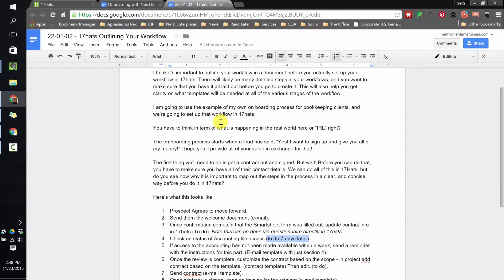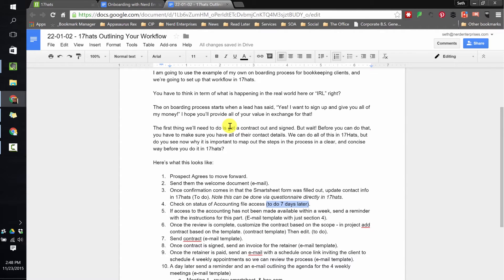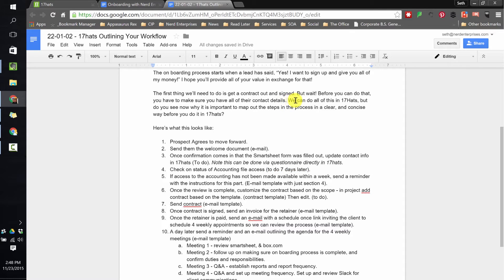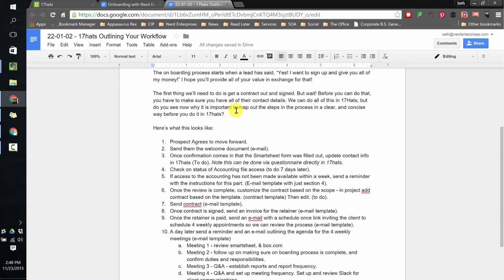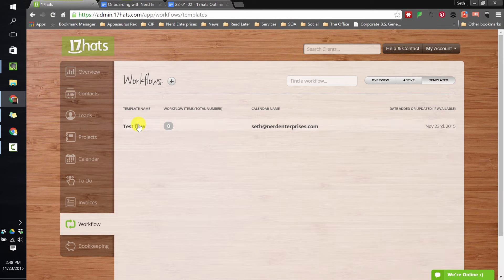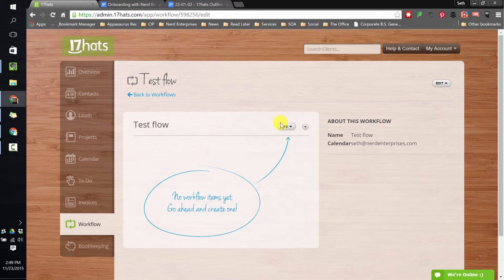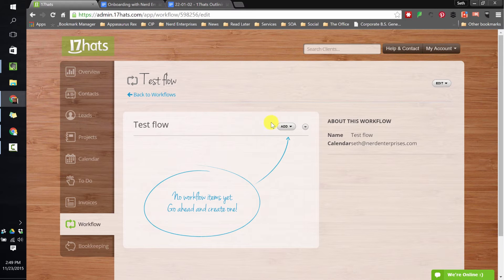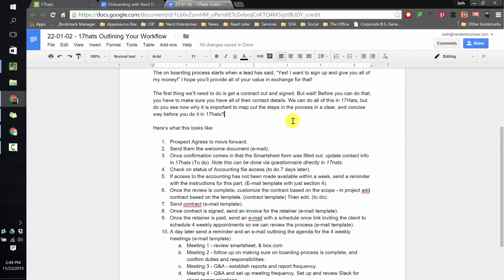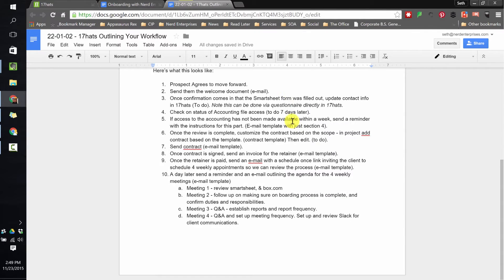And you're going to see even in the write-up, and I explain this. So the onboarding process starts when a lead says, yes, I want to sign up and give you all of my money. Of course, I'm being funny. I hope you'll provide all your value in exchange for that. The first thing we'll need to do is get a contract out and sign. But wait, before you can do that, we have to make sure we have all of your contact details. We can do all this in 17 Hats, but now you can see why. Because as you start trying to set up your workflow and trying to establish what needs to be done, you start realizing, wait, I can't do that until something else is done. I can't even send out a contract until I've reviewed their books. So it's important to outline this because otherwise you're going to get ahead of yourself most likely, only to find that you have to go back and add things in.